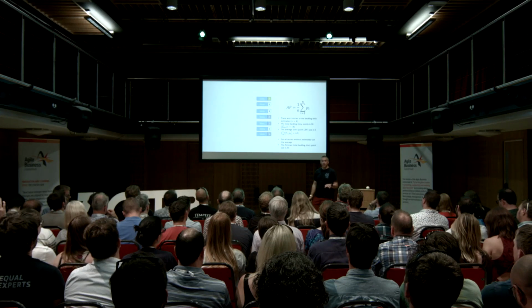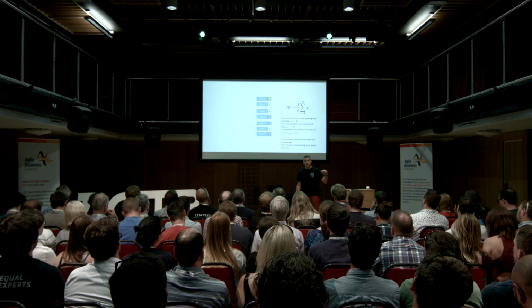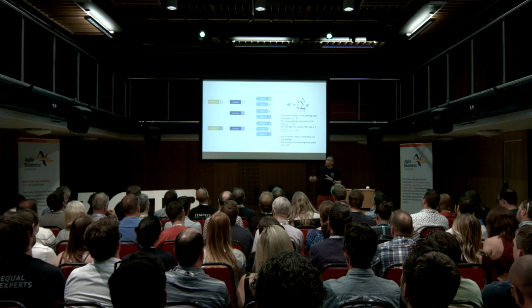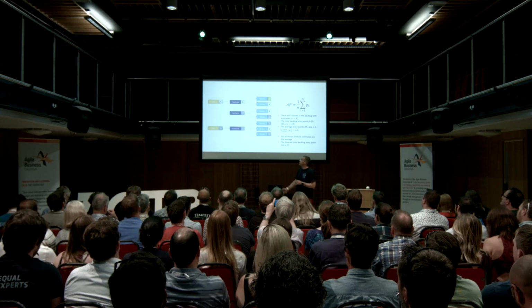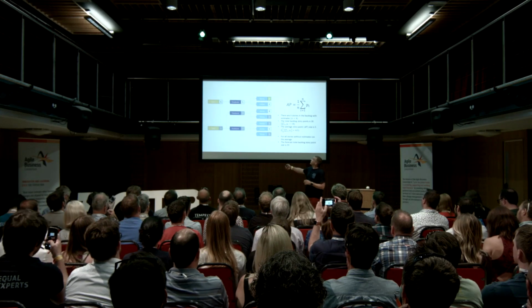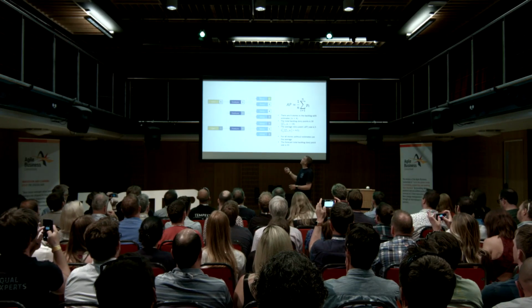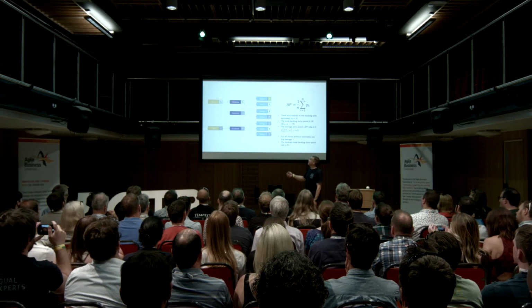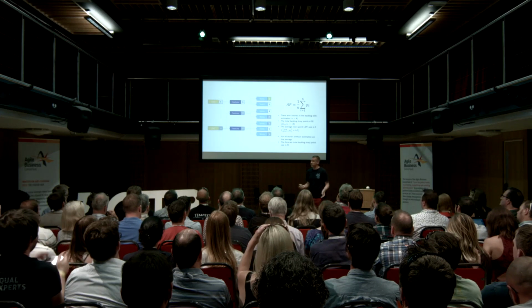Now I said that it works better if you've got levels in your backlog. So if we pull that in and have a look at how that looks. All I've got now is some features and some epics. We can see this top feature is made up of 2 stories. They've both got estimates, so we can just add these up, and we can say this feature is 5 points, and it's only got 1 feature in the epic, so that's 5 points as well.